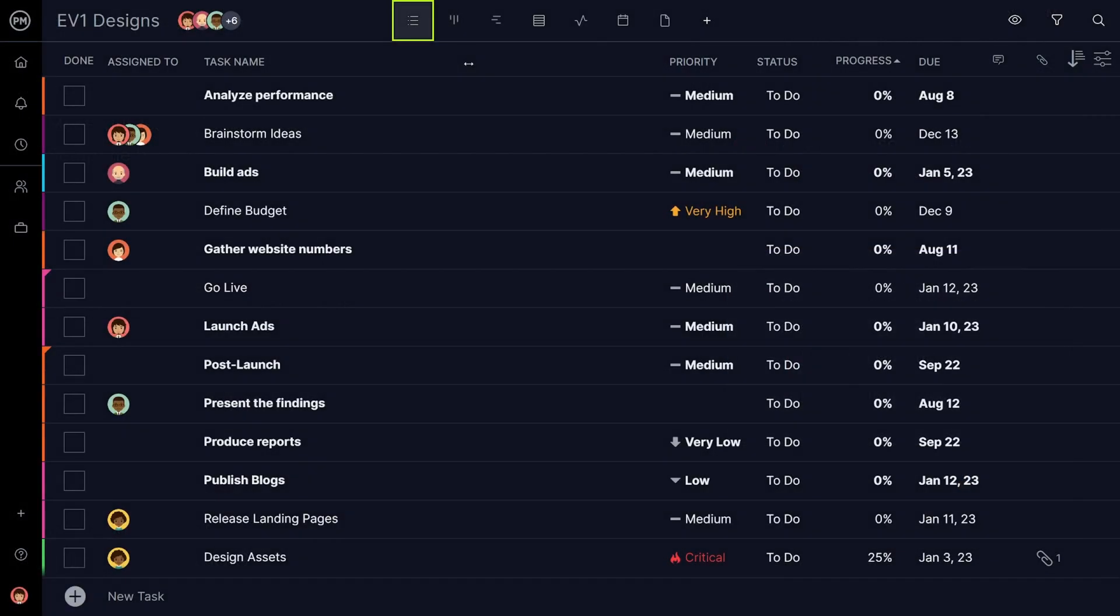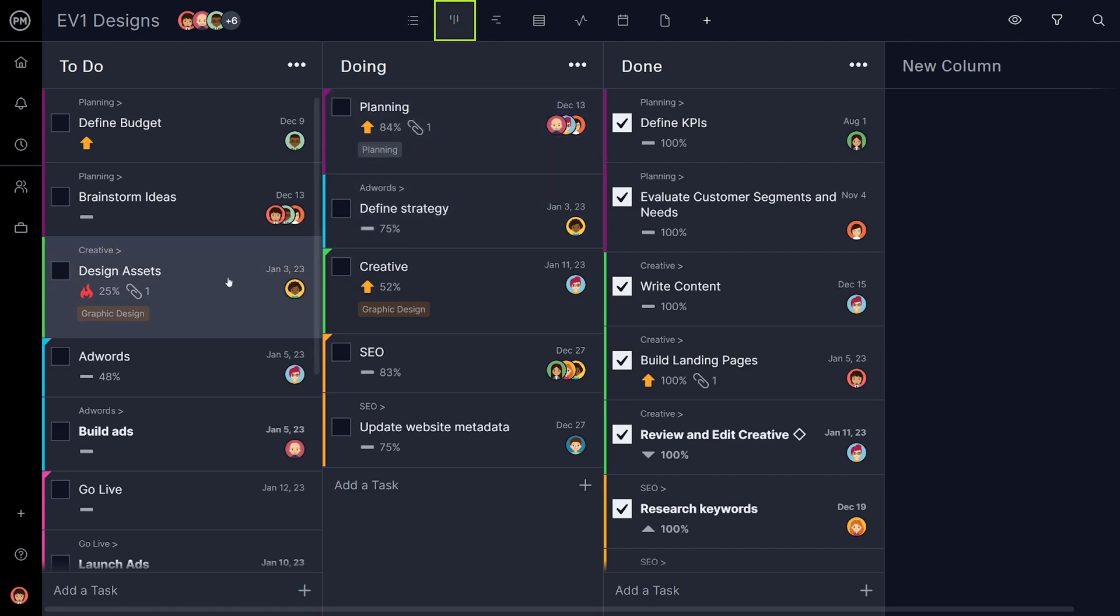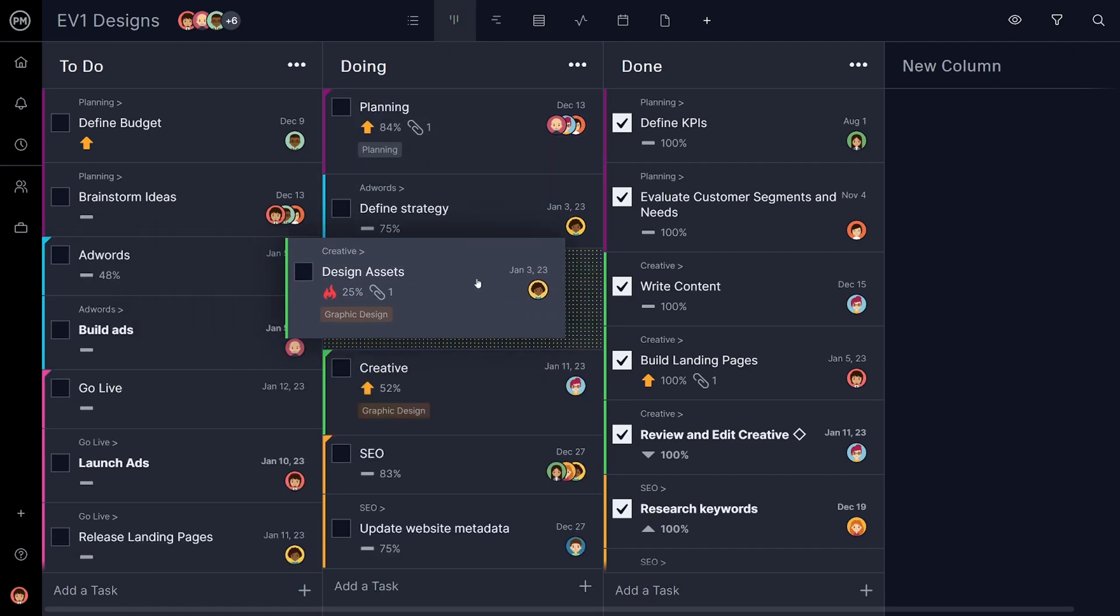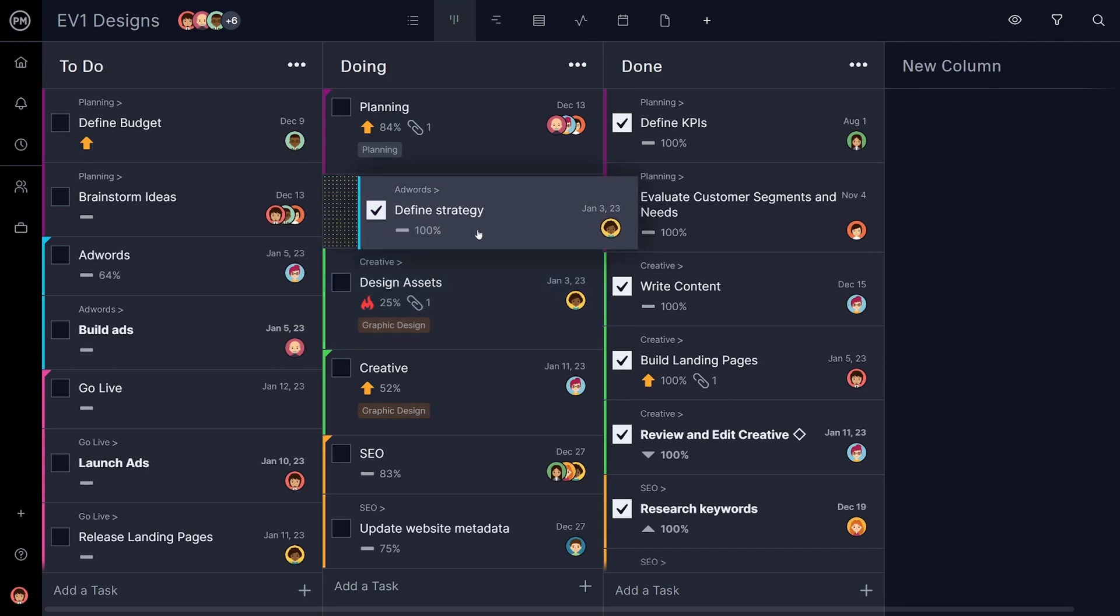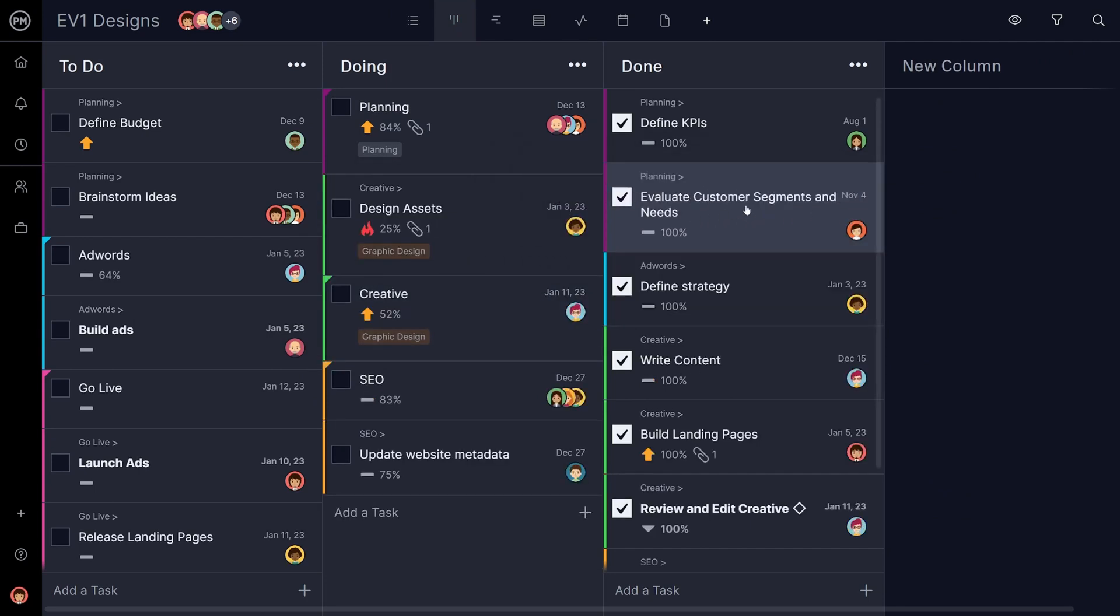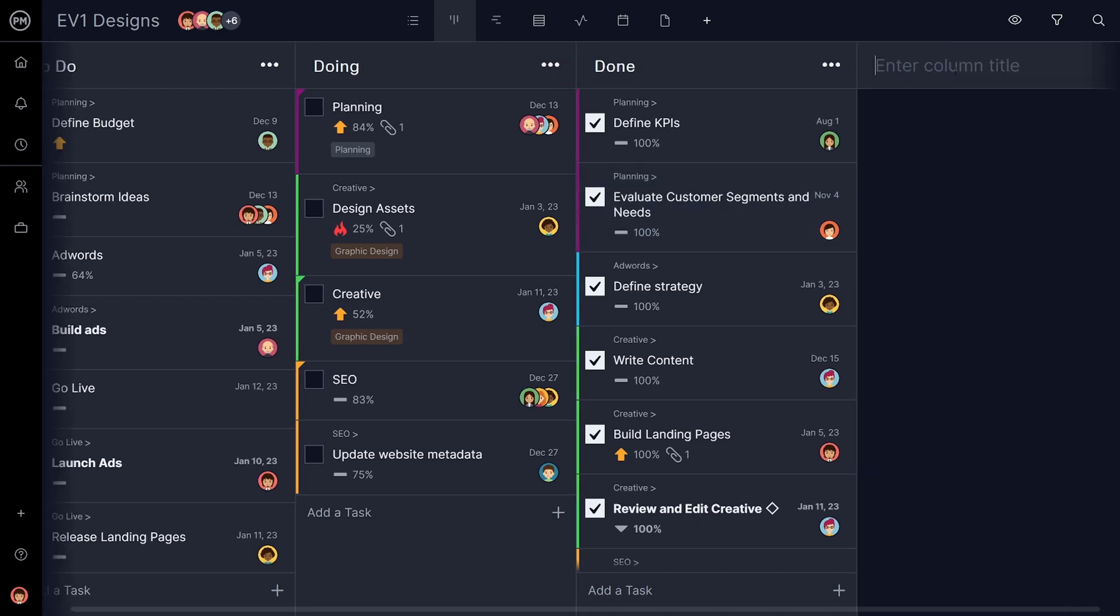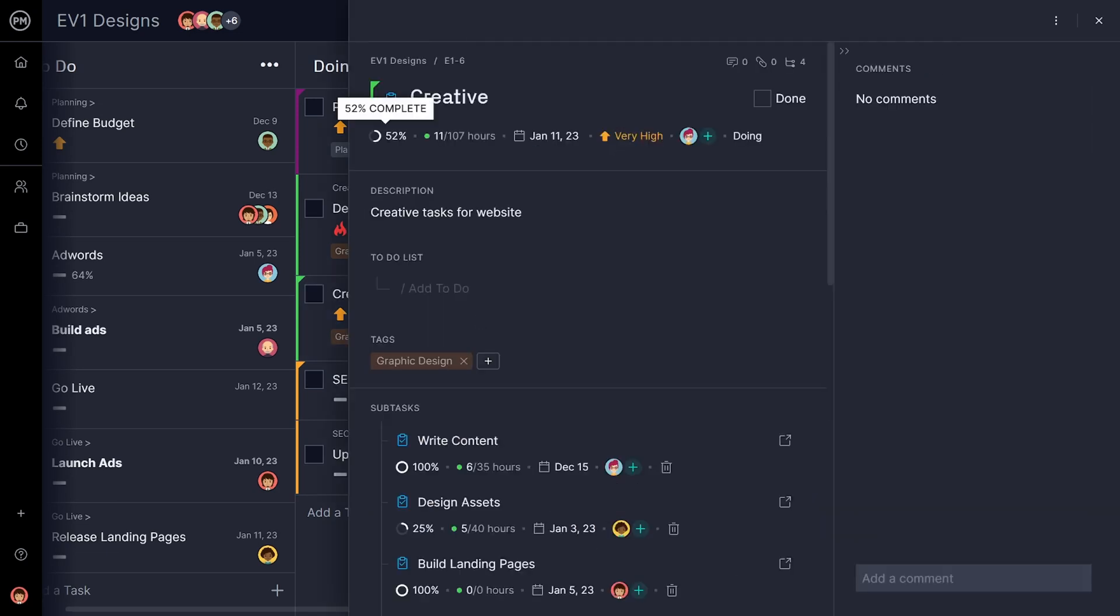Some team members may stick to the simple task list, while others may prefer the more visual nature of Kanban. Move tasks from to-do to doing and done with simple drag and drop. You can even customize the columns to suit your project workflow. The Kanban visualization helps teams better spot bottlenecks and keep tasks moving without interruption.